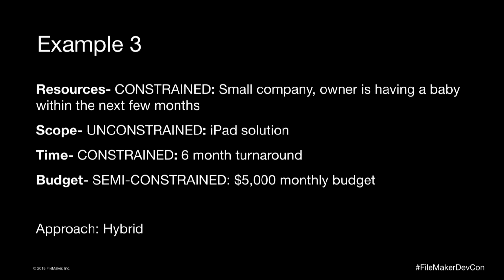Okay, so this is how I would do it. Again, I would gather up all the requirements up front, get the owner to sign off on them because they need to go off and have a baby and take care of that, and we don't want to be asking them any additional questions. We also know that there's only $5,000 a month, which might be a decent chunk, but I'm going to say only $5,000 a month, and go with the fact that we have to deliver pieces of the full project in a monthly fashion because we're going to be constrained by how many hours we can work a month.